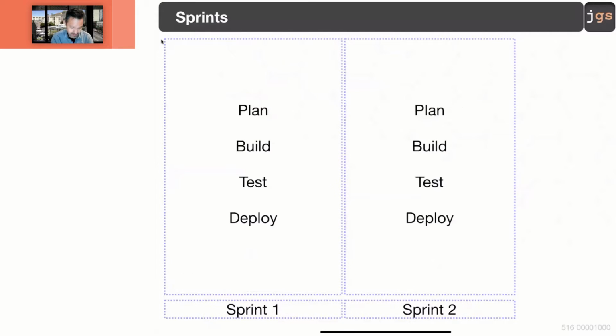When you have that, I need to be clear. Every single sprint should be about all these activities. If you're going to run a sprint, it's not about one sprint collecting requirements, another design, and the next one programming and so on. That is waterfall. Your sprint has one goal, and the goal is to create a product, a working product. So your sprint probably is going to include every single activity in the software product life, right?